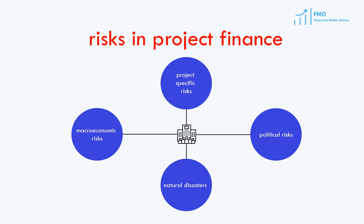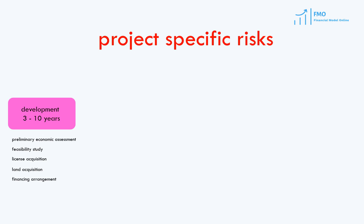Let's start with the Project Lifecycle to better understand the project-specific risks. The first stage is Project Development, when the project sponsors have to carry out technical and economic evaluations, obtain all the necessary permits, and acquire the land where the project will be built. This development stage takes anywhere from three to ten years, dependent on the country, industry, and project.